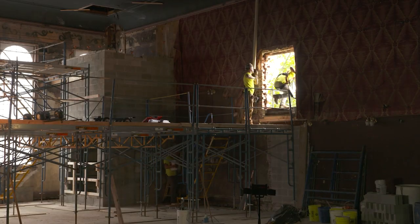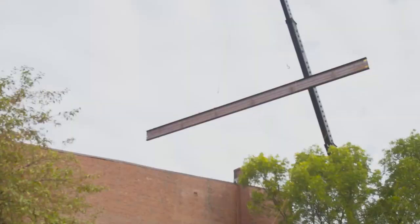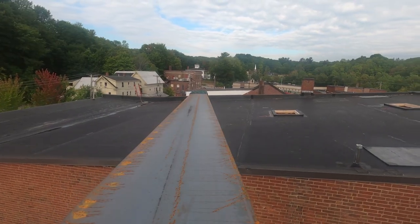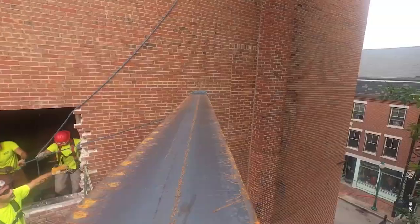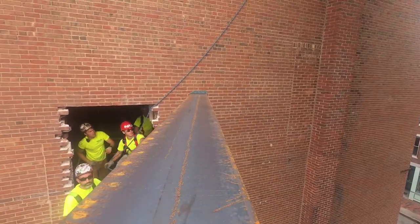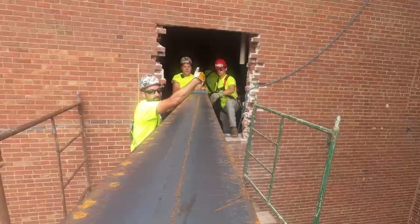The challenges of the project were myriad: the COVID-19 pandemic, 2 floods, workforce shortages, inflation, supply chain issues, and even the war in Ukraine, which affected steel prices. A project budget that began at $4.1 million ballooned to $9.3 million.